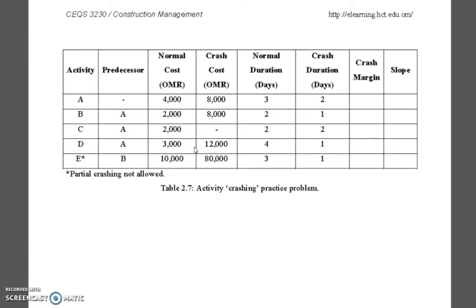في هذه الحالة من يكون الأفضل؟ يكون الأفضل إني أتأخر في المشروع 3 أيام وأدفع 3000 ريال، لأن اليوم الواحد غرامة 1000 ريال، أو أكبس المشروع هذه الـ3 أيام وأحط فيها مثلا 10000 ريال؟ مصلحة ومفسدة. أو ممكن تقول لا، الريبيوتيشن reputation of the company is very important.